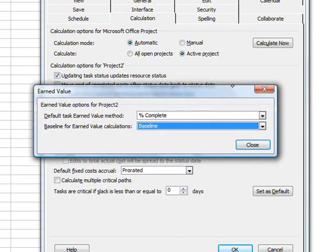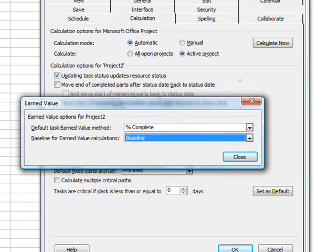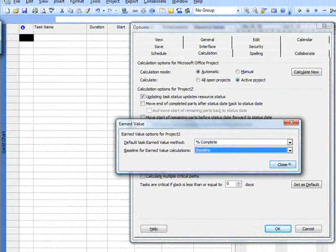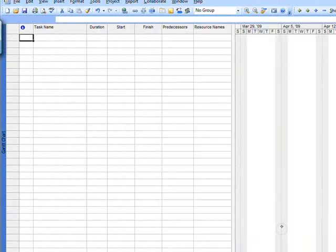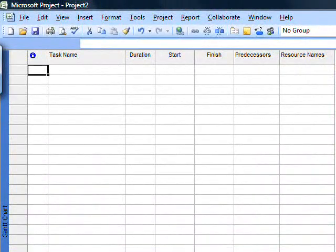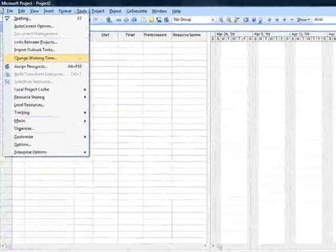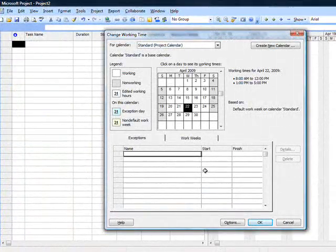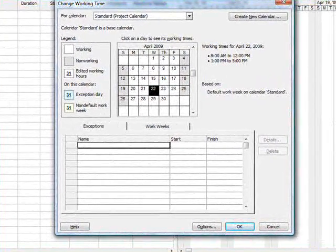As you evaluate and manage your project using the earned value numbers, you'll be setting the baselines. Every time you set a baseline, you save that data. With that stored, you'll want to select your working time — this is your master calendar. Later we'll add resources and you can affect their calendars as well, for personal vacations and things like that.